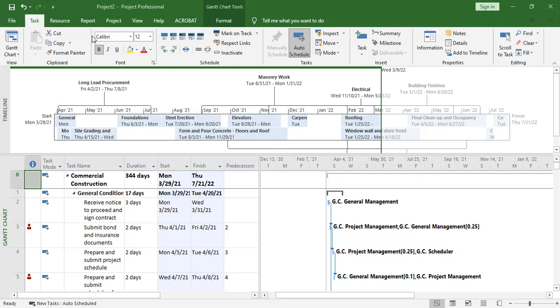Okay, if now you're suggesting that you started the project already and maybe you jumped some steps, what you will do, you use earlier dates. Like the project start date will be a bit backward, not the one which is in the future. Then after that, you set the baseline. Then you start tracking. Then now you come updating.